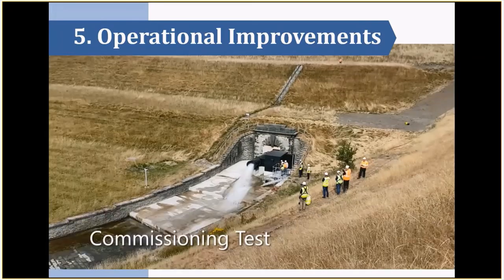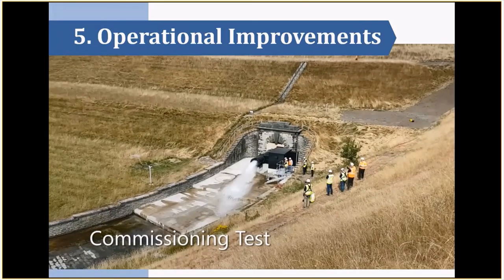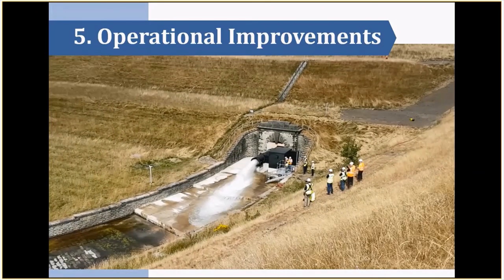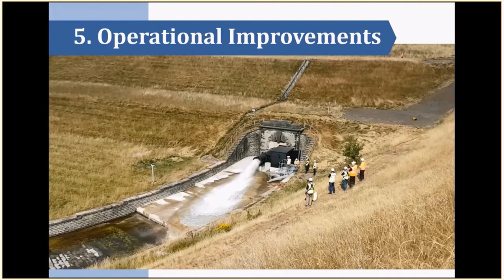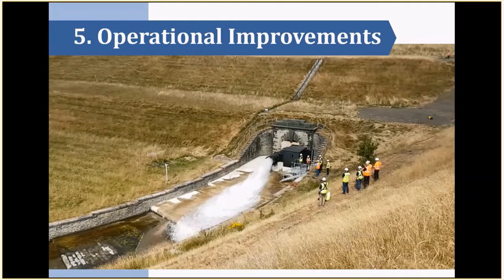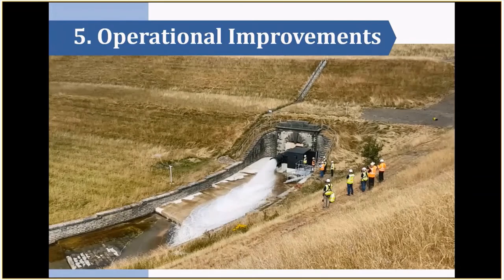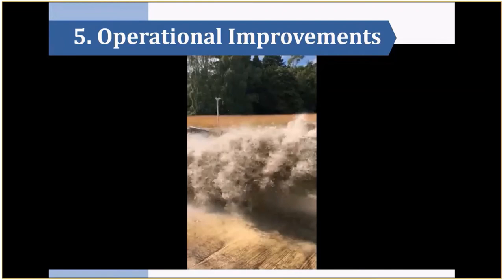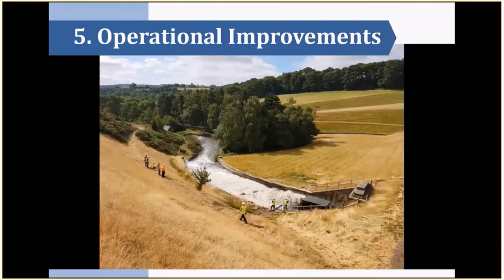This next video shows the commissioning test. So this is back in summer 2018. Where the team are operating the valve for the first time and proving that the work has been completed to the satisfaction of the client and the government inspecting engineer. And here we can see the full flow of 6 cumecs, which is the full discharge capacity of the system.